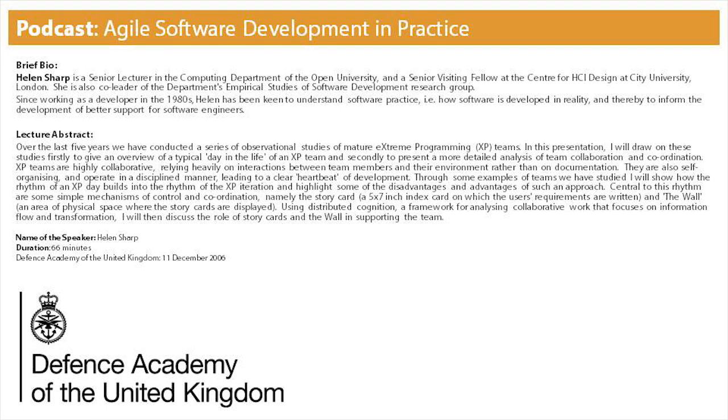And you literally go around the team. Everybody says something about what they did yesterday and what they're going to do today, working out what stories they're going to do the following day and who's going to work with whom. XP teams are very self-organising, so you don't have a manager standing there saying, right, I want you to pair with you today, you go off and do that story. It doesn't happen. I haven't seen it happen at all. There was one team where we had someone who was a manager who sort of fed stories. He'd say, here's the set of stories we have to do this iteration. It's quite unusual, but he was sort of acting as a manager and a customer in some respect. He would feed the stories through, but the team was left to organise themselves as to how they got it done in that time.